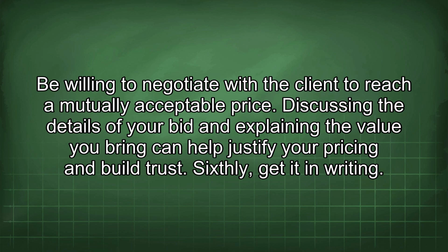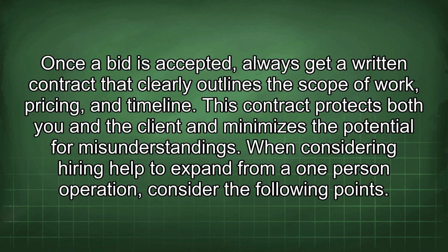Sixthly, get it in writing. Once a bid is accepted, always get a written contract that clearly outlines the scope of work, pricing, and timeline. This contract protects both you and the client and minimizes the potential for misunderstandings.